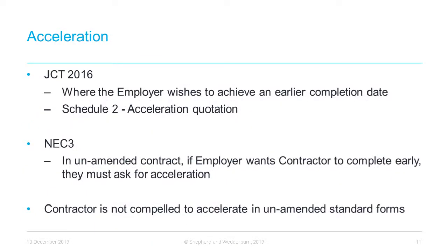So, in our discussion of time events, it is worth noting acceleration. This term is used to describe a variety of different concepts, sometimes describing the process of speeding up to meet the current completion date if there's already been delays to the project, or of speeding up to complete earlier than the specified completion date. It is the second scenario that is classed as contractual acceleration under a JCT or NEC